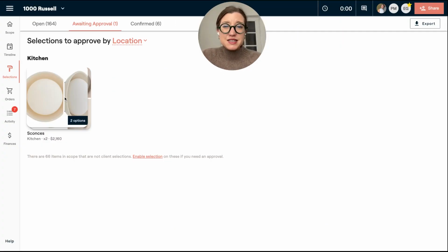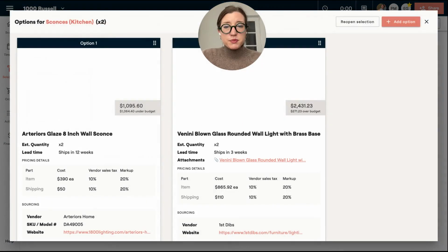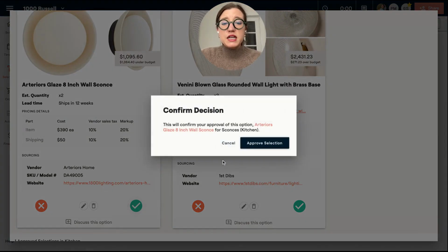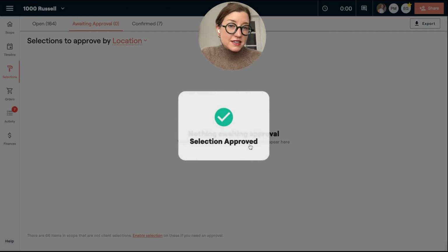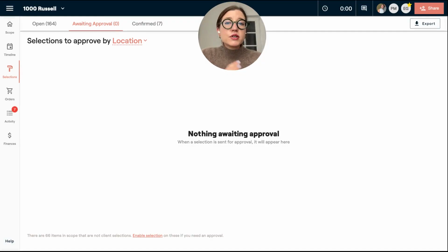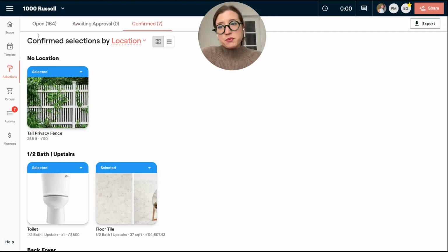So as you're doing a design build, you're speccing out the design at the beginning. You don't always have to put prices in here. There may be moments where you want to go in and get quotes on things, but you're approving the design direction. That's totally okay. You could get it approved at $0. Later, you'll just have to go in and revise it or bring in a quote to get some confirmed pricing. I'm going to go ahead and use this to get some quotes on what I want to present to them as far as construction goes.